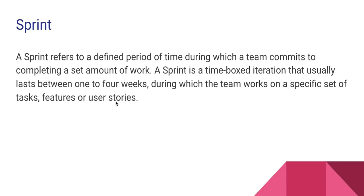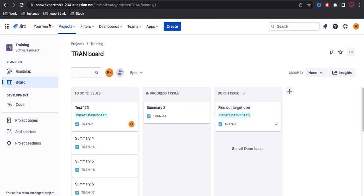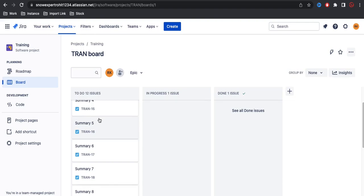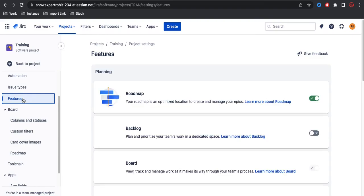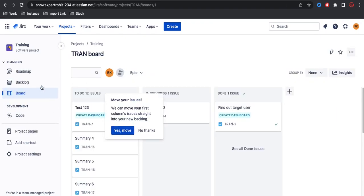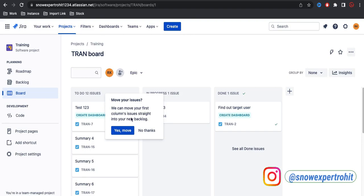At this moment in my Jira project you can see there are no sprint and no backlog enabled. That's the reason all these stories or tasks are present on the board under the board. What we can do is go to the project settings, and under project settings there is an option called Features. Under Features you will have the option called Backlog. Once you turn it on and go back to the project, you can see on the left side we have a backlog column. There's a pop-up asking if we want to move all to-do stories to the backlog.